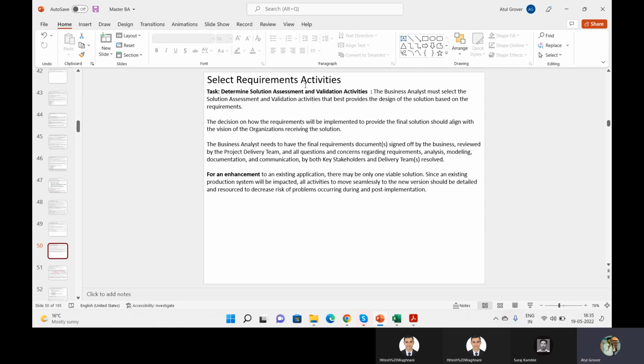They did not return to me. They said, okay, we will update you in 2 days. Fine. After 2 days, I sent a reminder again. They did not come back to me. And when I was near to starting my next sprint, I sent an email keeping my PO in CC: boss, you did not give me a clear requirement on that part. I'm taking it out from my sprint.